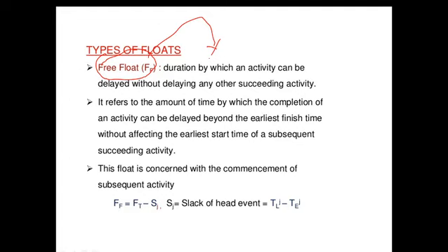The concept of free float is based on the possibility that all events occur at their earliest time. So, the main logic behind free float is occurrence of activities at earliest time. On the logic of earliest times, this concept of free float is dependent.